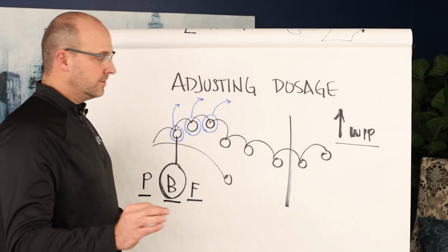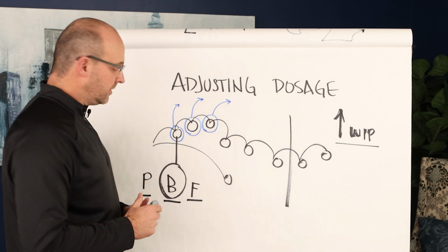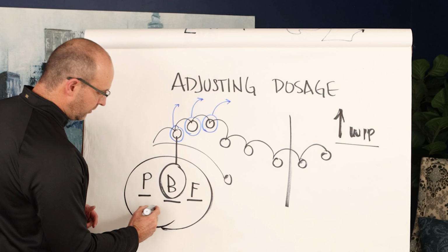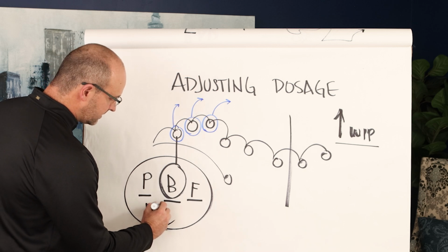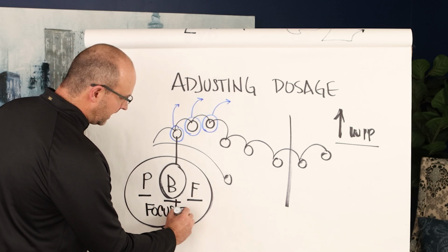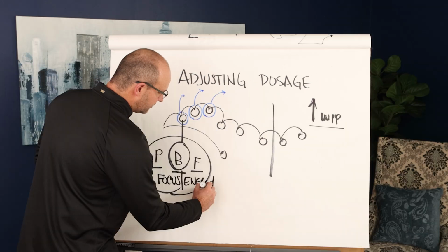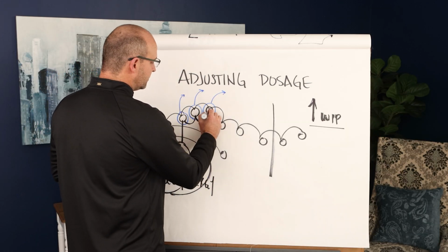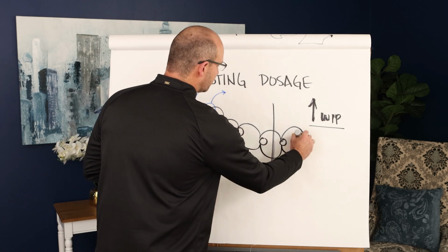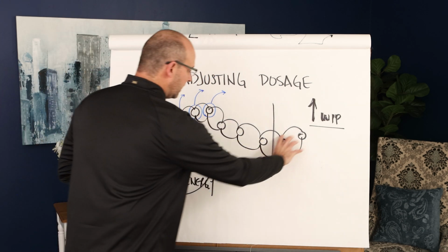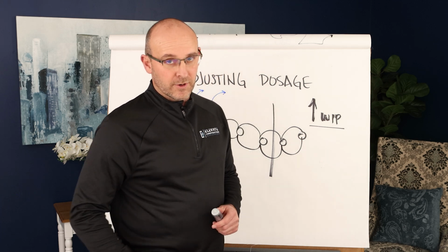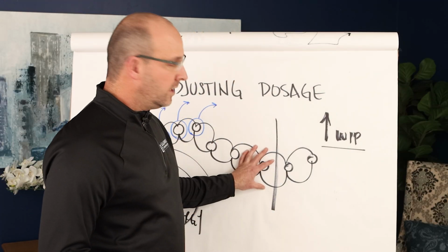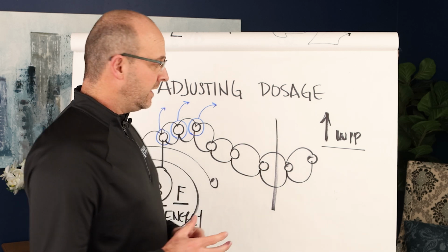And so here's the main concept. It is better to increase the dosage of planning, building, and finishing, or I would say your focus. I would also say probably energy, the energy of the team, to actually just doing one thing at a time than it is to just do more and more things with a low dosage of focus and energy and end up with a lot of rework and work in progress and a lot of open work fronts. The goal is to have as few tasks open that we have to come back to.